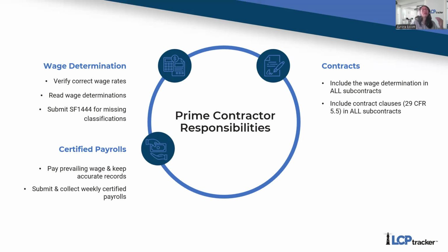Certified payroll reports. You have to read them, review them, make sure that your subcontractors are in line, and then you have to submit that to the awarding bodies. Now, friendly note here as well, certified payroll reports need to be submitted and collected on a weekly basis, okay?